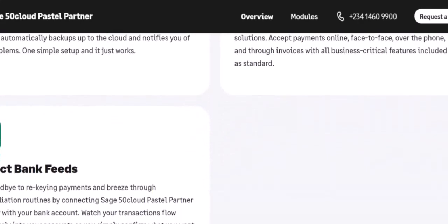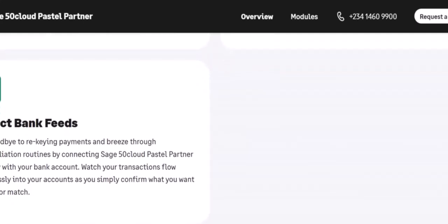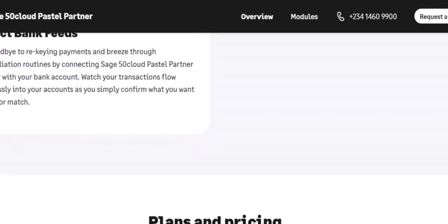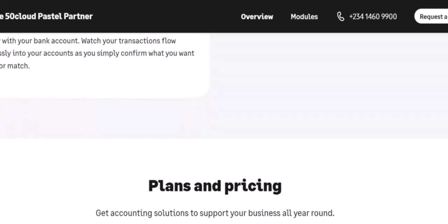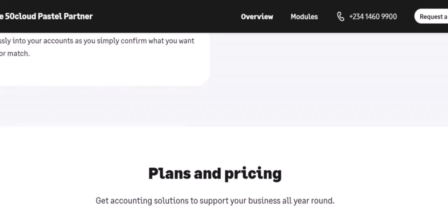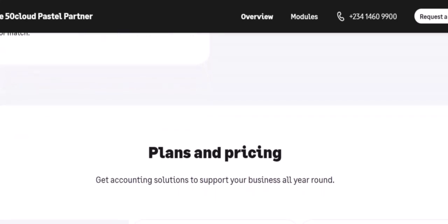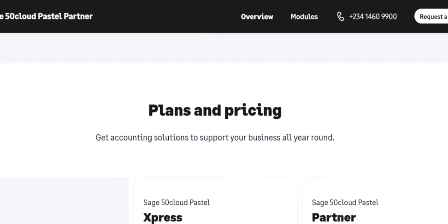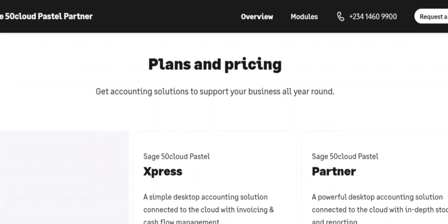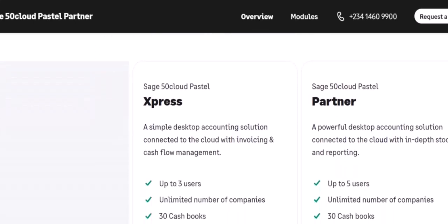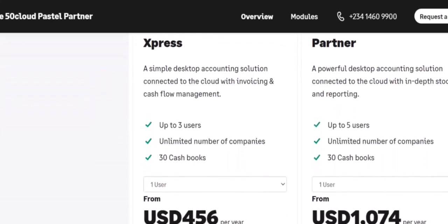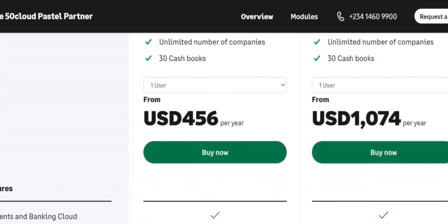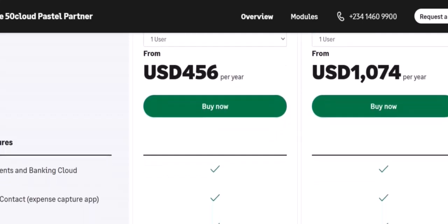It goes beyond basic accounting software by providing the tools necessary to meticulously track and analyze project-related costs, offering invaluable insights into project performance and overall business profitability. At its heart, Sage Intacct's job costing feature allows businesses to capture all direct and indirect costs associated with a specific project. Direct costs are those that can be directly attributed to a particular project, such as labor costs for team members working on the project, the cost of materials used, and any subcontractor fees specifically incurred for that project.